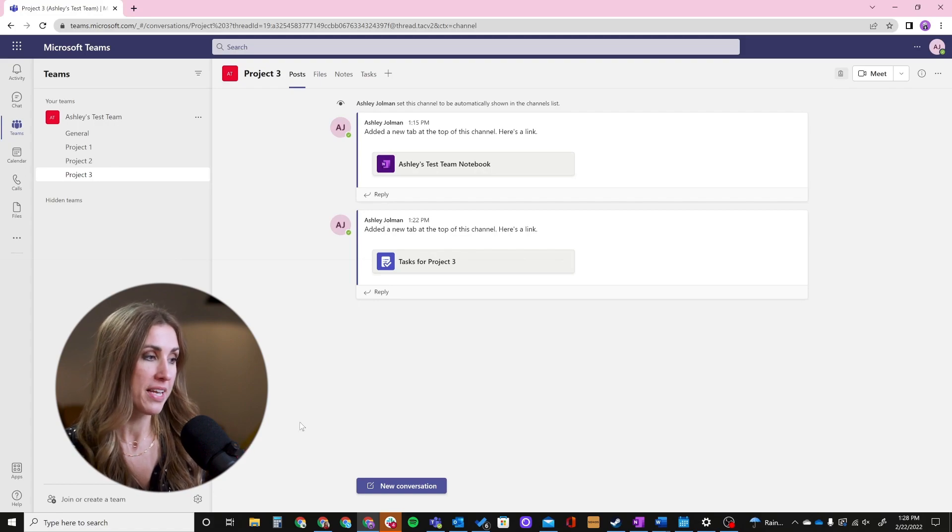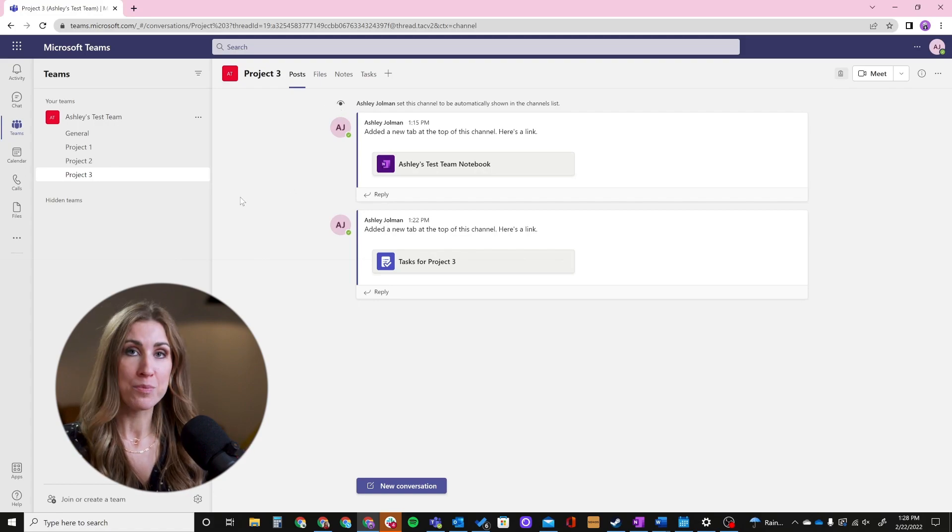Now that we've gone through the setup of an example project in Teams, how can we use this for future projects? If you've found what works well for your team, you can actually save yourself a lot of time as a project manager by using your project setup as a template. We have a whole other video on this if you want step-by-step instructions on how to use a current channel setup as a template. Next time you create a project — say Project Four — you could just use your template and your tabs will automatically set up the way you have them here. This is a huge time saver, makes it easy to set up future projects, and the biggest benefit is that your team is already familiar with the setup. We'll throw that video up in the cards so you can check it out.